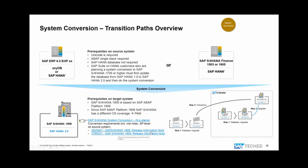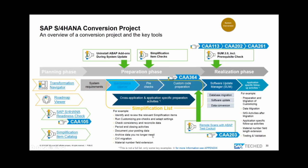A system conversion project involves a planning phase, preparation phase, and realization phase. The realization phase uses the Software Update Manager (SUM). Several sessions are available: CA113, CA202, and CA261 cover the Software Update Manager; for custom code preparation, there's hands-on session CA364 and lecture session CA203. Other tools supporting the preparation phase include the Transformation Navigator, the SAP Activate roadmap, the readiness check, and the simplification catalog — all with hyperlinks for more information. There's also a dedicated session for the readiness check at TechEd.